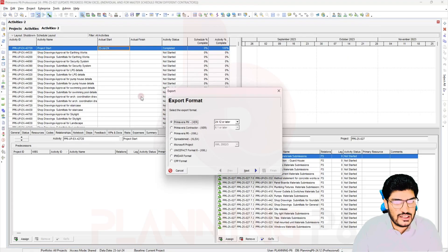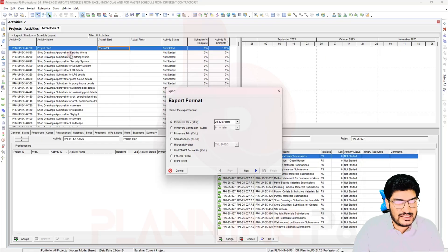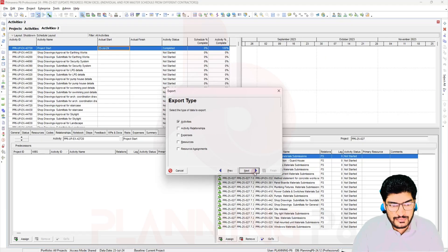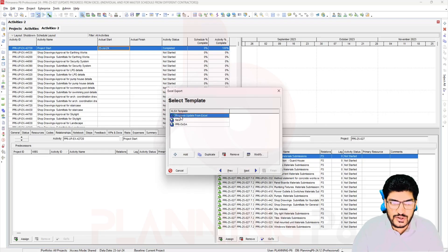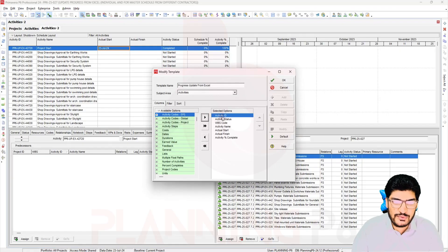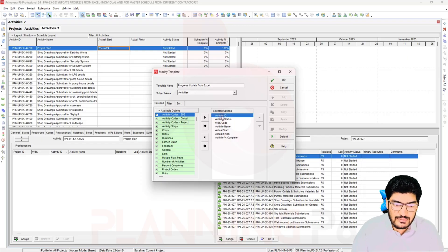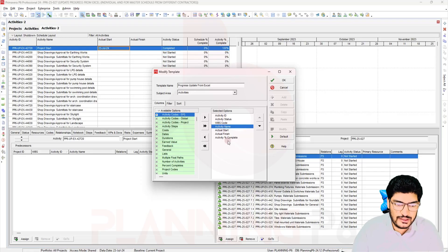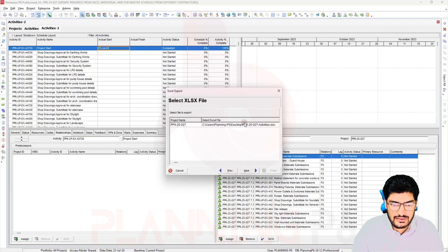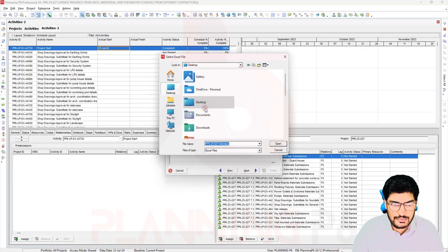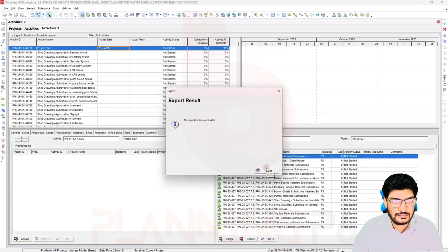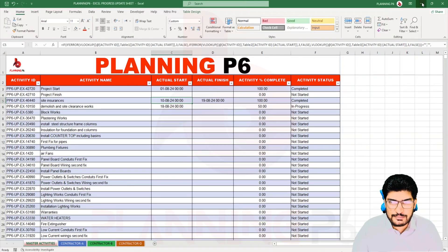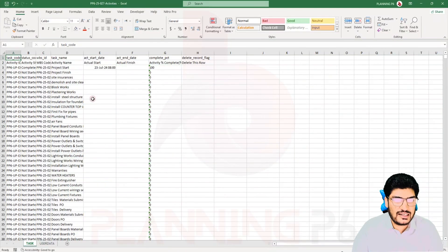Now, going to Activities in P6 — even using this Activities window is fine; it's the same window but without the WBS. You can also manage this with the WBS. I'll click Export. I have prepared an export template called 'Update Progress from Excel.' You can also add a new one. The columns include: Activity ID, Activity Status, WBS Code, Activity Name, Actual Start, Actual Finish, and Activity Percent Complete. These three columns are mandatory and cannot be removed: WBS Code, Activity Status, and Activity ID. I'll click Next, choose the save location on the Desktop, then Finish and Close.